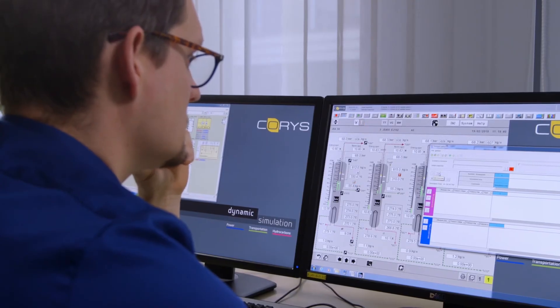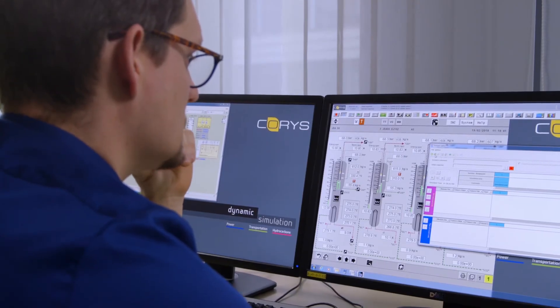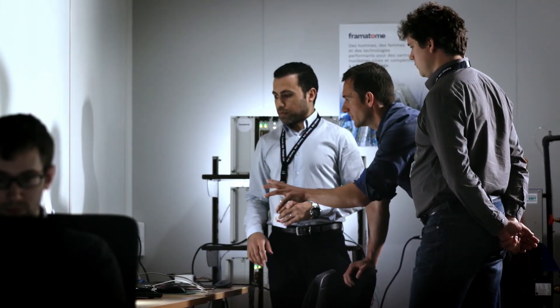The return of experience of different projects has shown that using an engineering simulator helps to secure the project execution and installation on site. On the EPR project for example, it has helped to clarify the interface, verify execution of procedures and so on.